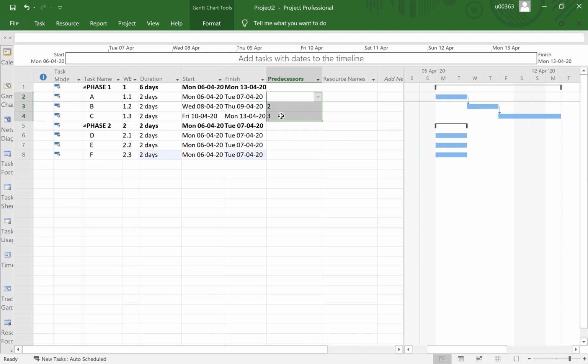What is this numbering all about? 2, 3. This numbering basically relates to the numbering 1, 2, 3 on the left side column here that belongs to each of the rows. It basically refers to the row, or the ID number for each activity. And that ID number is the one that Microsoft Project can read. Microsoft Project does not recognize the activity by the name of the activity.